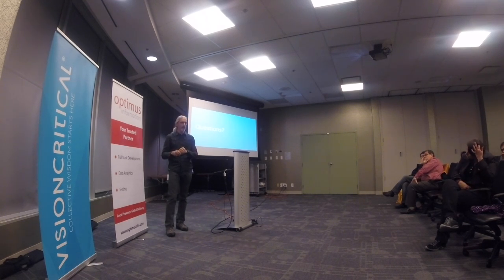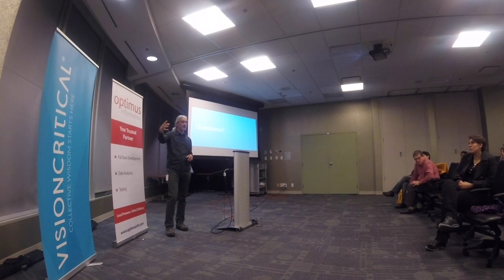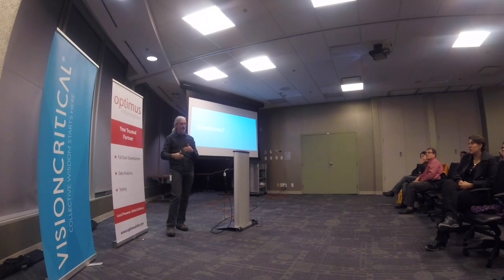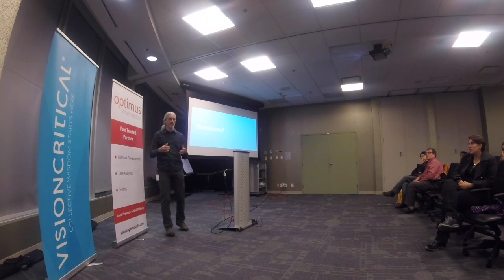So you can say, okay, maybe we're talking about this, and I've got this idea that this part of the product, maybe it's the UI, is actually the highest risk area. Then you can say, okay, so what are we really changing in there? We know we're changing something, but what does that look like? And you can explode that diagram into, well, there are these components in JavaScript in that UI, and here are the bits that we're adding or changing. Maybe we're introducing a third-party library, whatever it is, you can start to talk about that design in detail, start to see the risks at that level, and have that conversation and understanding.